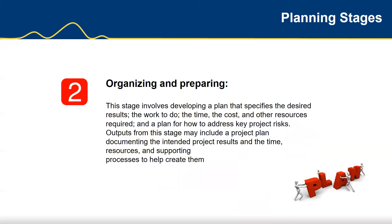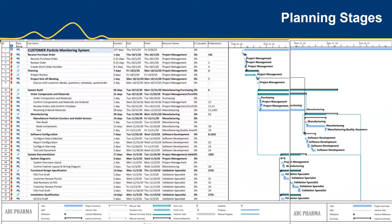Stage two involves developing a plan that specifies the desired results, the work to do, the time, the cost, the other resources required, and a plan of how to address key project risks. Outputs may include a project plan documenting intended project results and the time, resources, and supporting processes to help create them. Here we have an example of an EMS project management Gantt chart. Gantt charts are used and each aspect of the various stages and timelines should be reviewed. The draft commissioning and validation documents should be issued, and it is critical that there is sufficient time for review and sign-off. Having all your ducks lined up will help you move into the installation stages more smoothly.